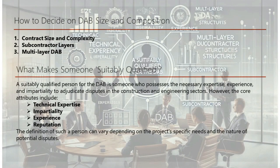DAB size and composition depend on contract size and complexity. For smaller contracts, a one-person DAB is often sufficient, while in the European community, three-person DABs are standard. Mega projects or those with significant technical complexity may require a five-person panel. Projects with multiple subcontractor layers might benefit from a common DAB or an interlocking DAB member who participates in several boards within the project.